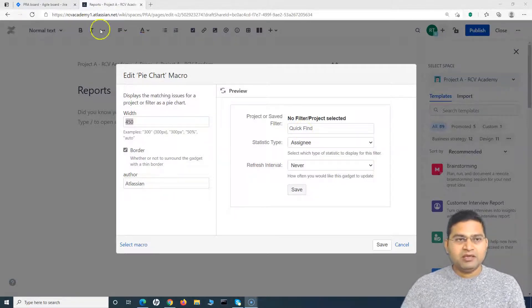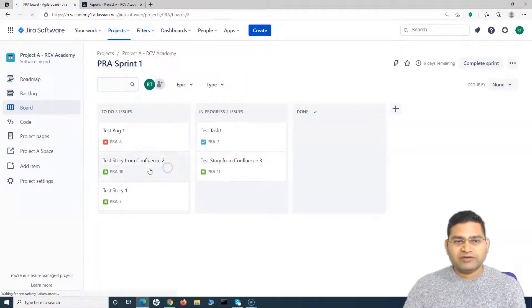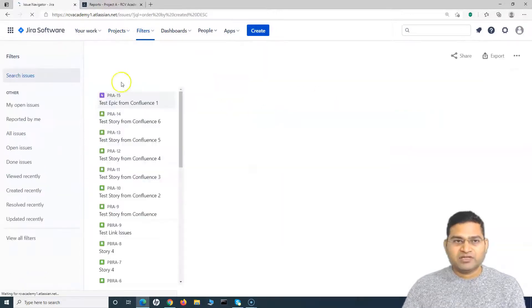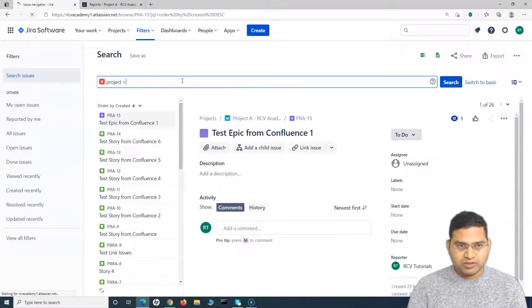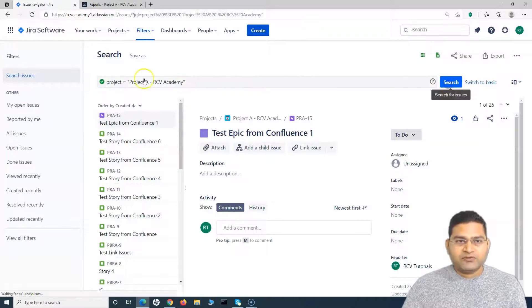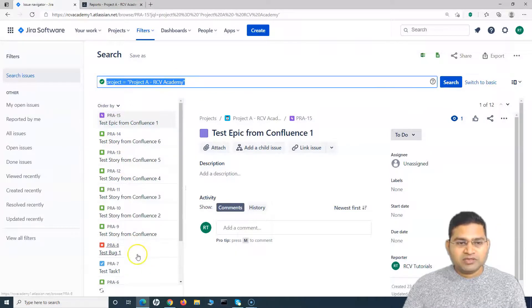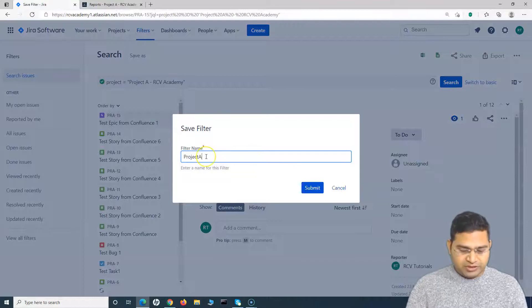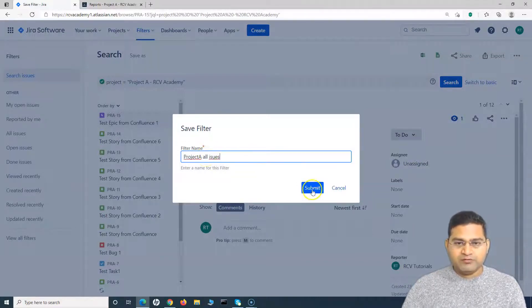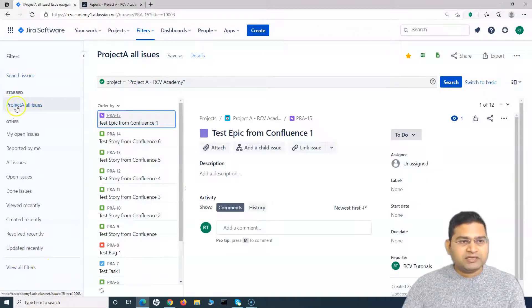I'll go to Jira's Advanced Issue Search to quickly create a filter. I'll set the query to project equals Project A to get all the issues in this project. Once the results appear, I click 'Save As' and name it 'Project A All Issues,' then click Submit. This filter is now saved.